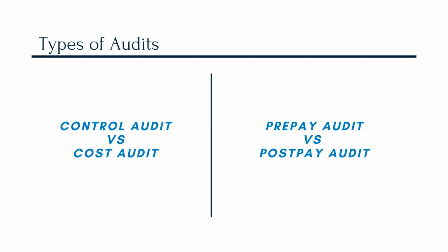Lump sum contracts are one of those examples where a post-pay audit makes sense, because the lump sum really negotiates the entire amount. You can audit the entire world of transactions all together and validate the quality of work and the timeliness of work. And ideally, you perform and complete that audit prior to the final payment, usually the retention amount, retained for purposes of any discrepancies, claims or disputes. That retainer is held by the owner for resolution on any claims that might come out.